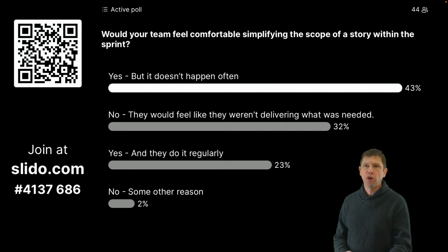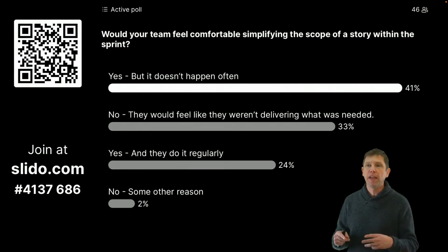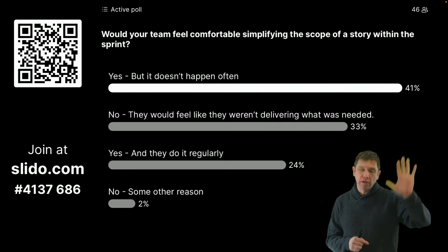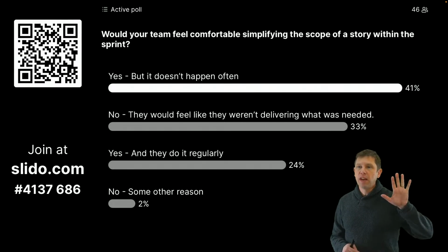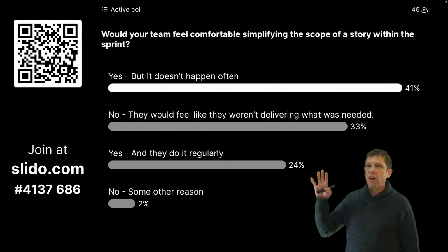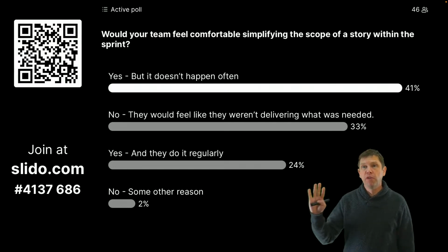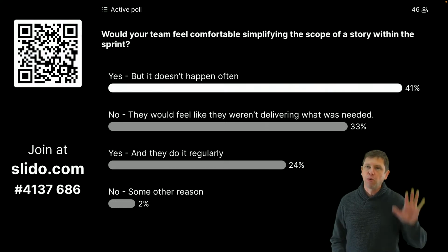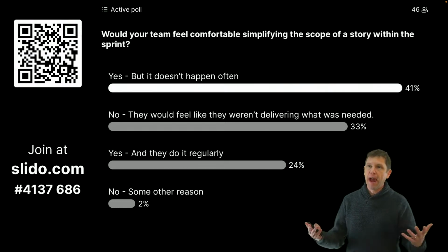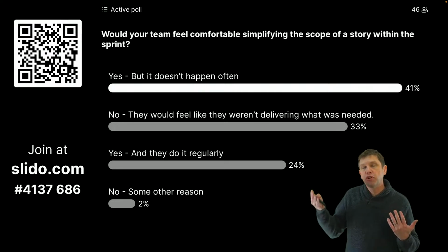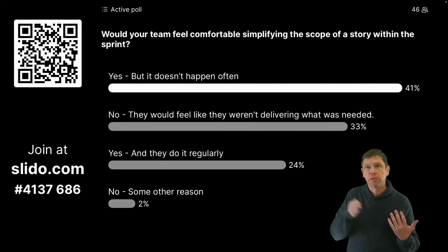Now, maybe we do choose to go ahead and do it before we go live, but we want to make sure we're not doing something that, if we've got story or part of story A that we cannot go live without, and then we've got another part of story A that we don't really want to go live without, but we could if we had to, we better not do that second part before we do everything else that's required to go live. Because if something happens, people get sick, schedule slips, whatever it is, we want to make sure that option of going live without it is preserved.